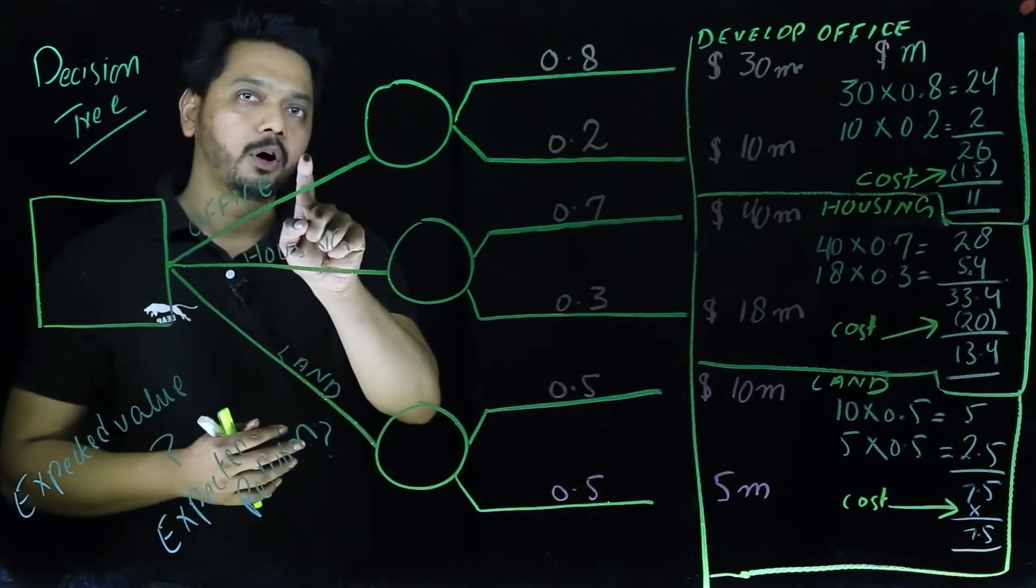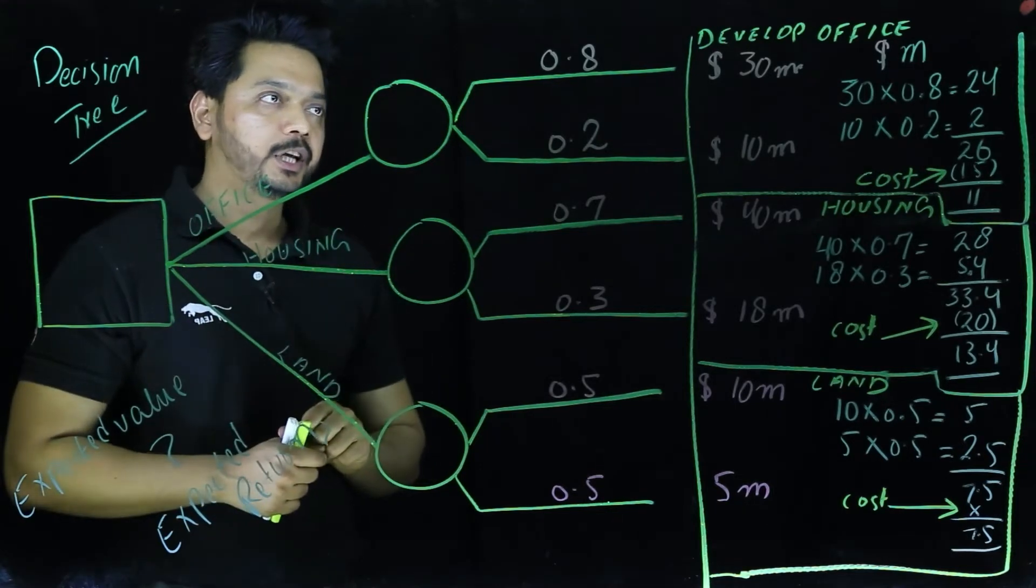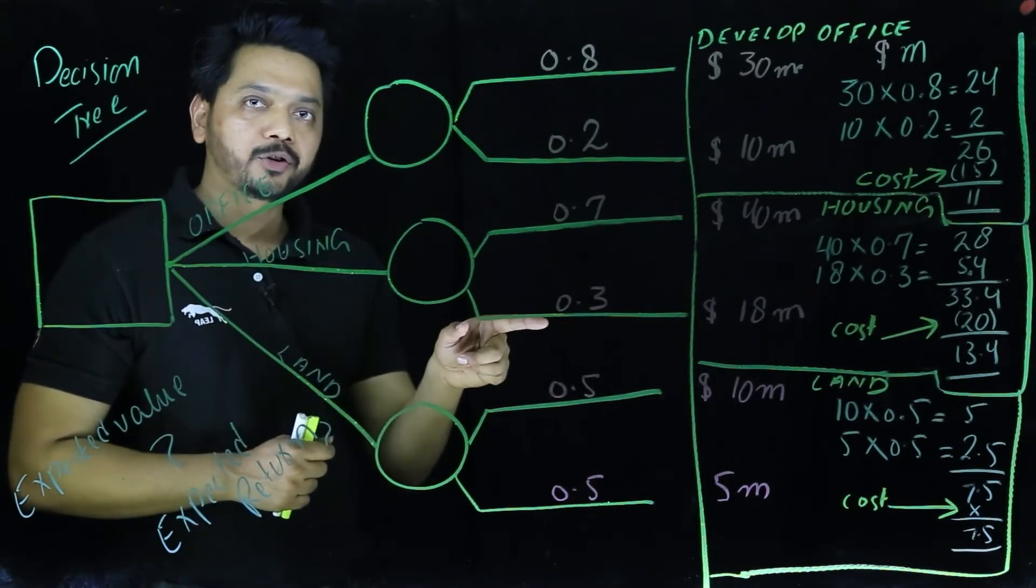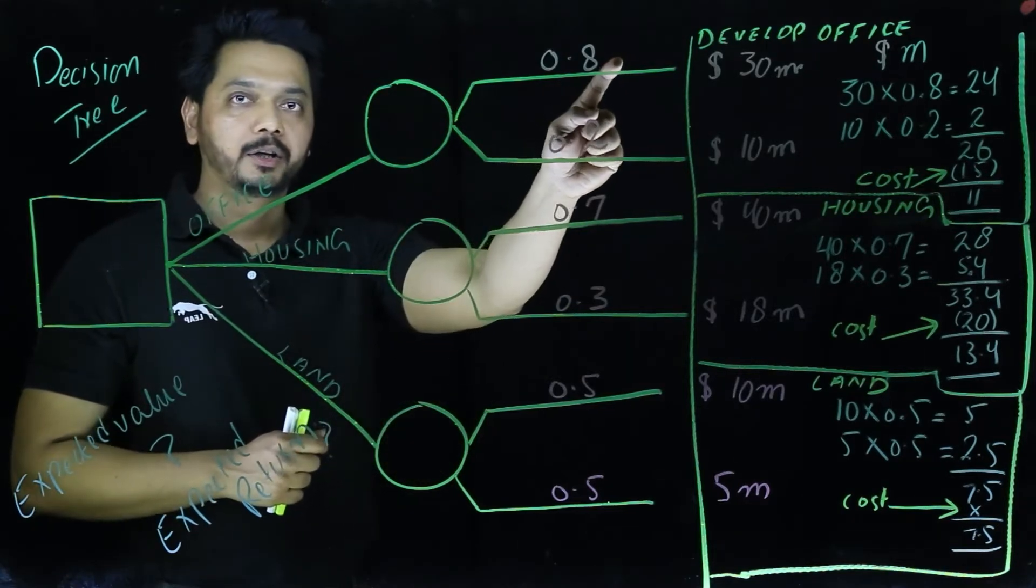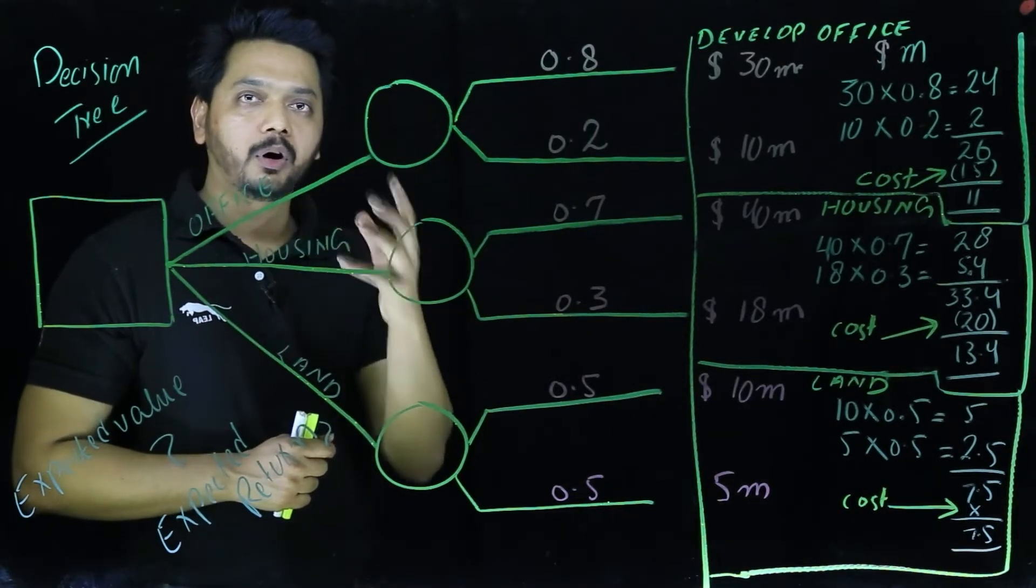Let's start. If they come up building up the offices here, you see the market information of expected failure and success is given over here. If they decide to come up with the offices, the expected probability of success is 80%.